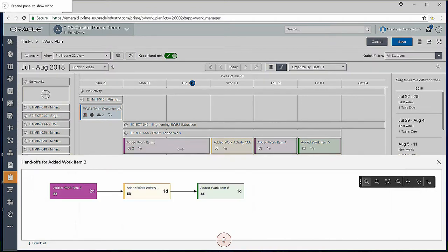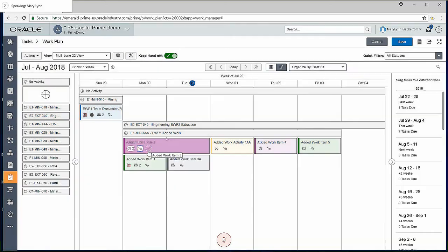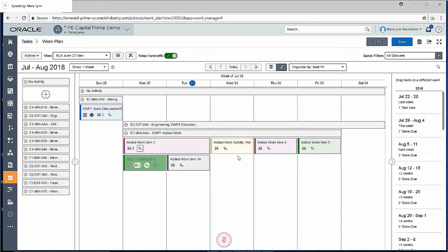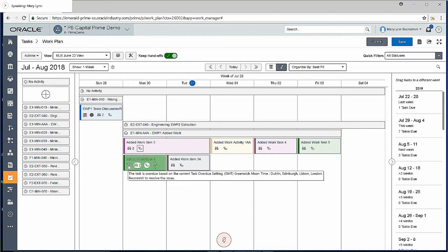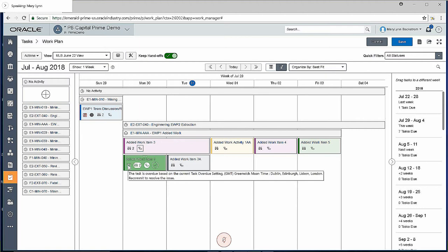I have got a little checkbox here that says task is not complete. So you see those particular icons across the bottom of the rest of the tasks that are shown on our board. You also have some other information that the software is trying to give us here. It's telling us this added work item one just underneath the task we were on is actually overdue. Yes, it is overdue. Just a heads up, this planning board works off of the system date. Where are we at right now? Not where your schedule has actually been scheduled to.